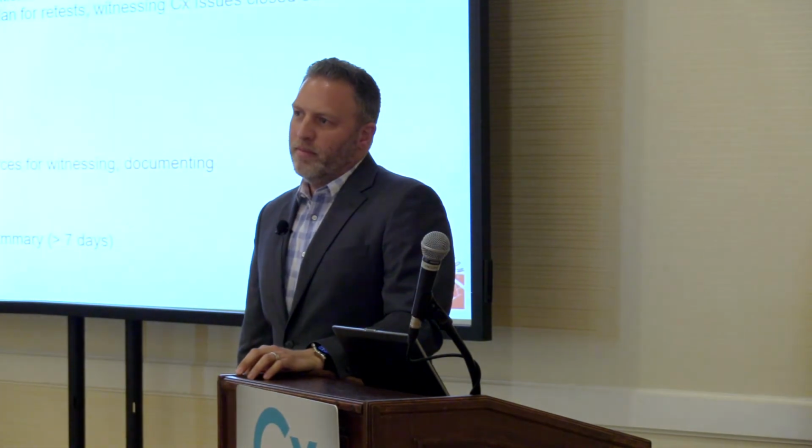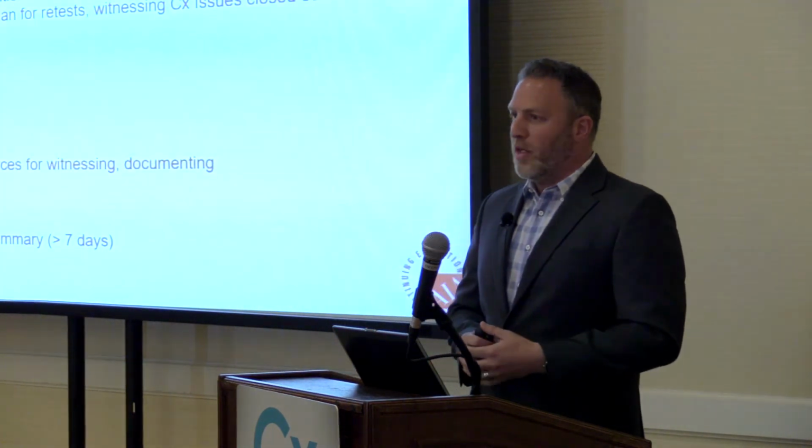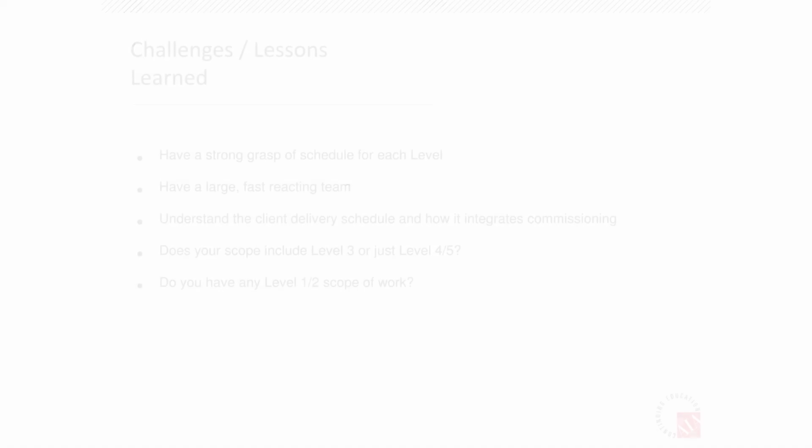Now you have other components that need to be commissioned, which might not be in your scope, like security systems. They're not going to start populating a data hall until they've proved out their own security. That could take months. We recently commissioned a data center. We finished it in December. The end user didn't start doing a deployment until April. So there is a little bit of lag time, but they need to hit that ready for service date ASAP. There are contractual obligations. There's money at stake if you miss those ready for service dates.